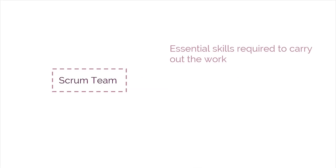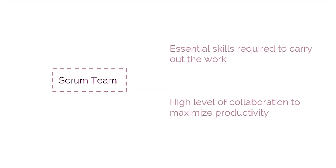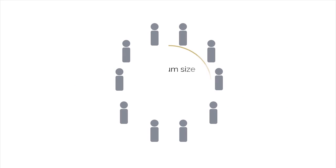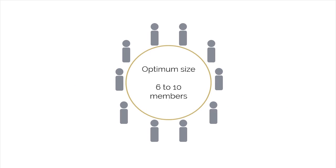It's also necessary to have a high level of collaboration to maximize productivity so that minimal coordination is required to get things done. The optimum size for a Scrum Team is 6–10 members, large enough to ensure adequate skill sets, but small enough to collaborate easily.